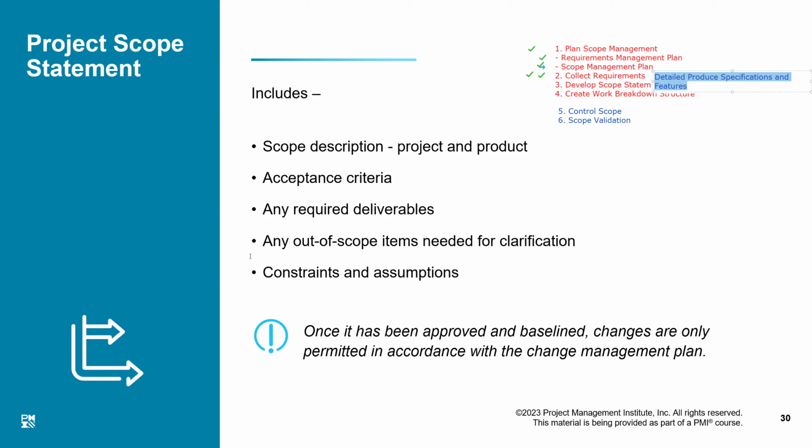Yes. Later on in the project, once we make the agreement, right? Yes. If the customer then says, those things that I've put out of scope, I want to bring into scope, that's when you need your change control. In a predictive project, we have to discuss that. It is not a one-sided decision by the customer, because we have an agreement with the customer, and the agreement is created before the project started. We are in a contract with the customer, right? So we are very clear about what is to be done and what is not to be done.